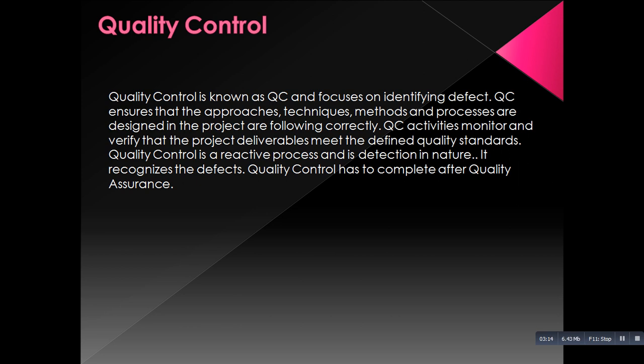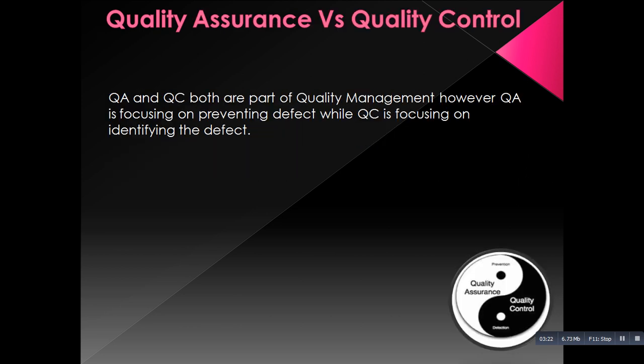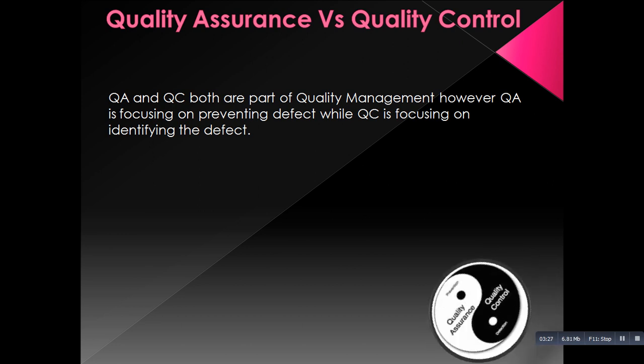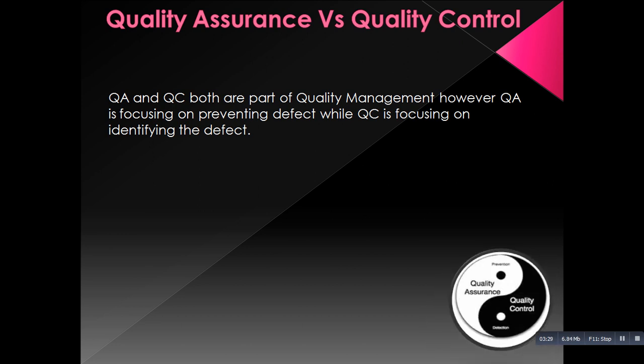Coming to the difference between quality assurance and quality control: both are part of the quality management team. QA focuses on preventing defects whereas QC focuses on identifying defects. Quality assurance is process-based whereas quality control is product-based. Quality assurance contains a process called verification whereas quality control contains a process called validation.